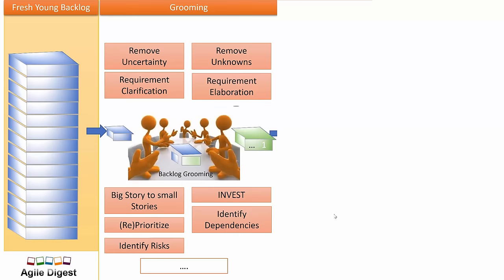Assume this is our product backlog — a very fresh product backlog where nothing is yet groomed. The product owner has created the backlog and there are lots of stories. When we actually do grooming, we have a session of one or two hours. We pick the first story, and the developer, tester, and scrum master — who facilitates — along with the product owner, go through each story and clarify doubts. The entire team gets clarification on all requirements, removes all uncertainty, removes unknowns, and elaborates the requirement.